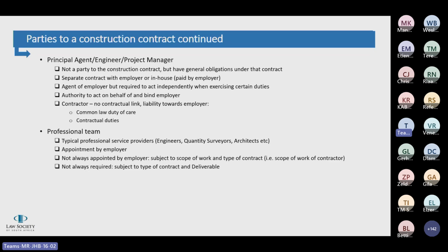And then again, although it is an agent of the employer and receives payment from the employer, it still has an obligation to act independently in the interest of both parties. Although from practical experience, our clients have told us that sometimes they do find it challenging, because although there's an obligation that the employer's representative needs to act independently, it is incentivized to act in the interest of the employer, which is obviously not supposed to be the case.